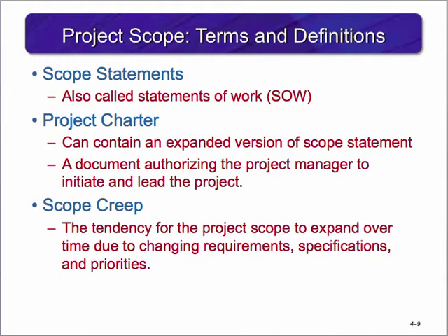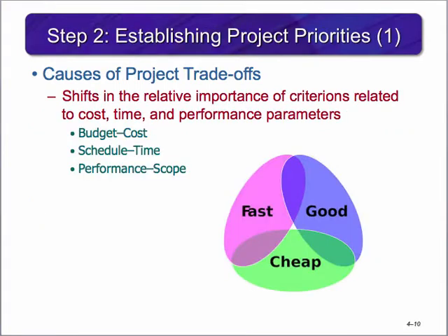We often point back to the statement of work to explain what is and what is not included in the project. And if they'd like to make change, it will require additional money and will likely impact the schedule as well. To my surprise, most customers fully understand the implications, and while they're not thrilled, they express understanding. Once you've received the go-ahead for the project, you, as the project manager, need to establish project priorities.